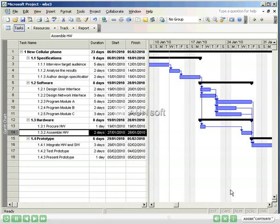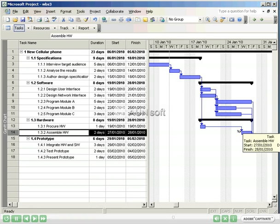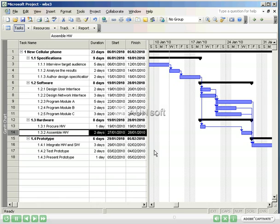You'll notice in the timeline view that Procure hardware still has a duration of one day. It is still connected to assemble hardware, but that the start date for assemble hardware is now five days after the completion of Procure hardware. Lag is extremely useful when dealing with external dependencies on a project, from waiting for executive sign-offs to vendor deliverables.